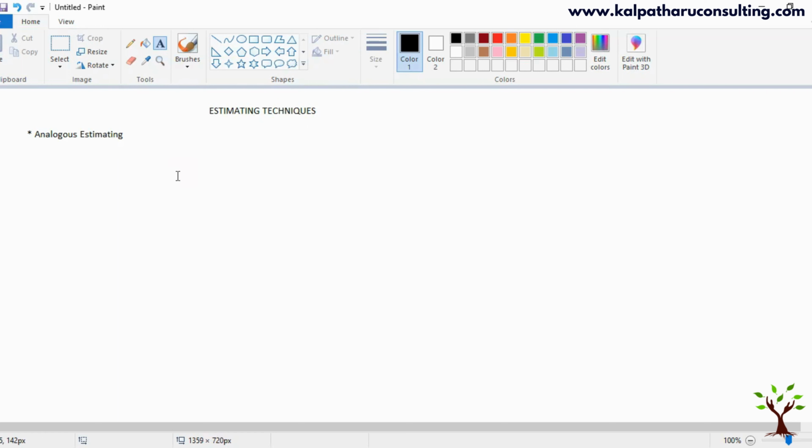For example, let's say in that ABC old project, they took 5 hours to build one unit. So for your project also, you are going to take the same duration. If they have taken 2 weeks, you're going to consider the 2 weeks. You're going to take the same data from the historical project. You're not going to consider any variables, any environmental factors. You're going to consider the data as such. This is called analogous estimating.